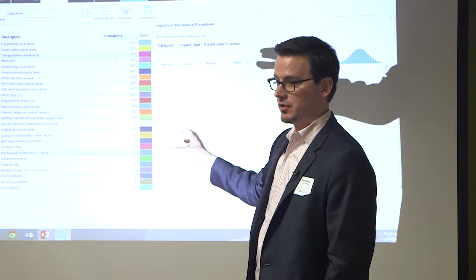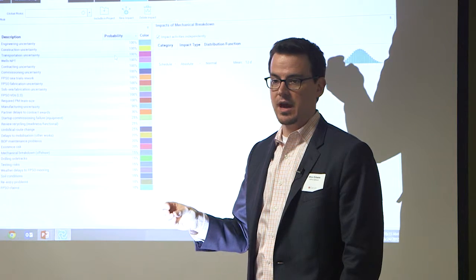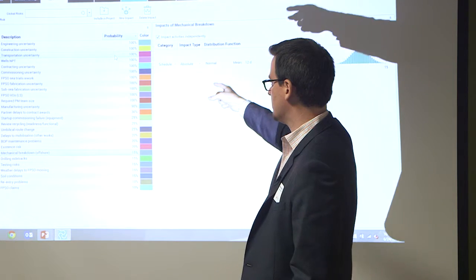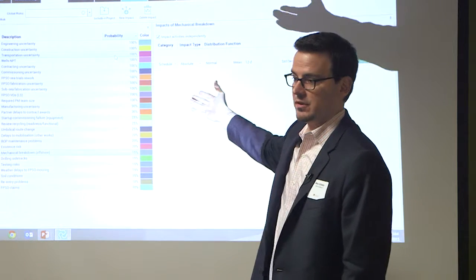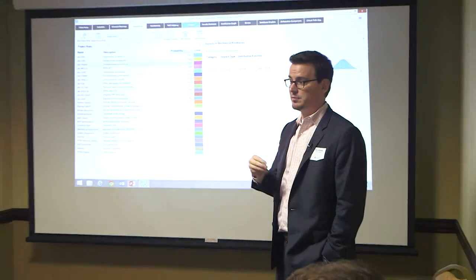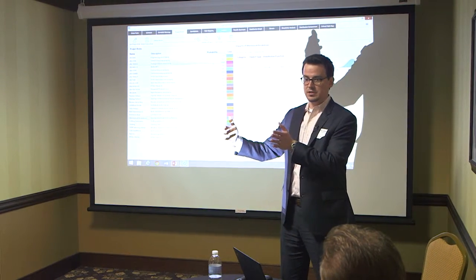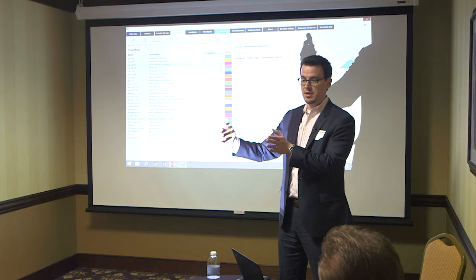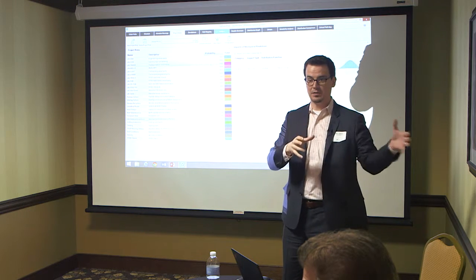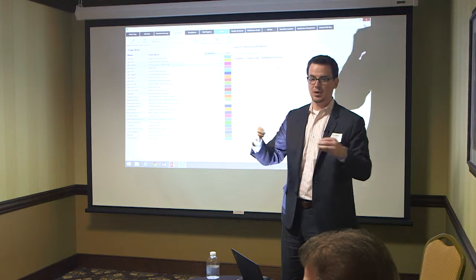So by capturing all of my uncertainty here. Right? One of the challenges of capturing uncertainty at the activity level or using templated quick risk or applying it that way is I don't know what it represents. Right? I lose track of it. Here I can easily go in and you can see in this model we've defined a series of uncertainty. I've got multiple different levels of uncertainty that I can apply to the activities. I can apply them to overlapping activities, right? So I may have an activity where I say, well, there's contractor uncertainty because I don't know who this contractor is, first time we've used them. I've got general labor market uncertainty. I can begin to stack up those different uncertainty factors, those risk factors against the activity, right? To really tease out some of the detail that before got lost, right?